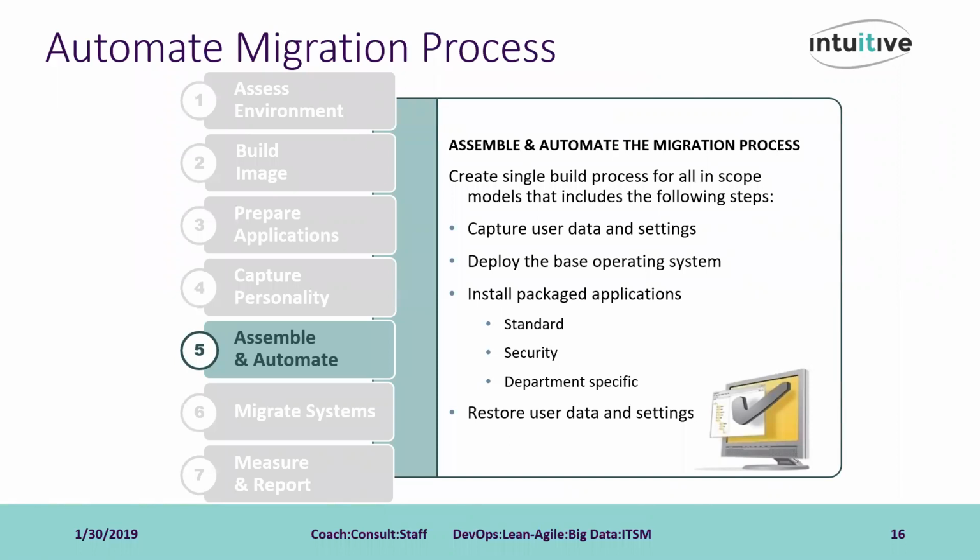Here I recommend a build schedule be created ahead of time. This schedule would list not only the target migration date, user sign-off, completed system migration, but also an area where you could track the installation status of any hardware prerequisites. So a listing of the software apps needed, as well as details around any user-specific data capture requirements for PC Transplant. That schedule would also list the user's department, and the specific imaging job used during that migration also.